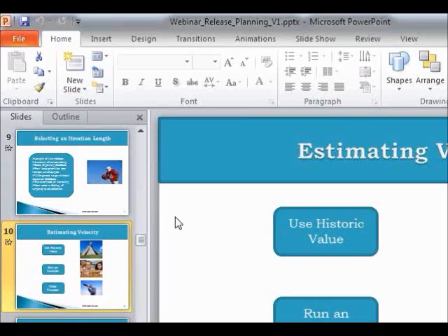Now, for example, if you're launching a job site, you have a minimum market condition of satisfaction that my job site should have a feature where it can receive profiles from the candidates and it can allow candidates to apply for the job and the recruiter should be able to post their job. So this becomes your minimum marketable feature. And in this case, the condition of satisfaction would be, I need to have a job site which facilitates a job seeker to find a job.